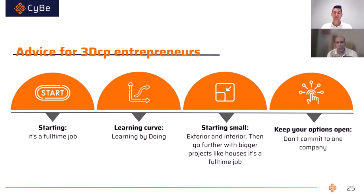But this also included a period of testing and validation in New Zealand. So you can shorten this period by waiting until you have the robot and do your validation. Or you might not need a separate validation. For example, if the testing has already been done in the Netherlands or in Europe, that may be sufficient, and then it gets squeezed a lot more, because the proof is already there. Exactly. So it is different in every country. Like I know in some parts of the world, there's no building standard, so if you just bring the robot, you're printing. I'm sure the guys in Japan had to do similar testing and a similar process. When you did the buildings in Dubai, you had to do testing in Dubai. So it is really dependent on how fast you can get the testing done and what you need to do.